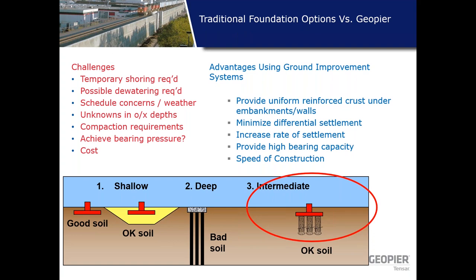Ground improvement also minimizes differential settlement along the length of the project. GeoPier elements are high-stiffness inclusions that attract more stresses. Being made of gravel, they increase the rate of consolidation in the matrix soils, especially if the soil consists of clay, by providing radial drainage. They provide high bearing capacity due to significant improvements in the mechanical properties of the soil, and offer speed of construction — because GeoPier is made of gravel, weather delays do not cause significant project delays. This option has become the number one preferred option for many design-build projects.